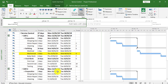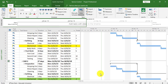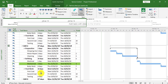We're now going to link Car One and Car Two together using the mechanical task — the yellow mechanical task in Car One and the green mechanical task in Car Two. To link these tasks, I'm going to select the mechanical task in Car One, hold the Control key down, and select the mechanical task in Car Two.